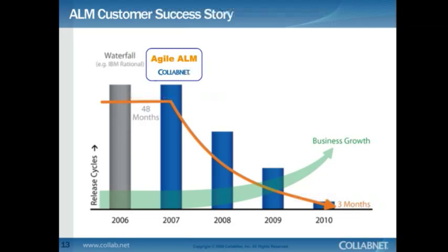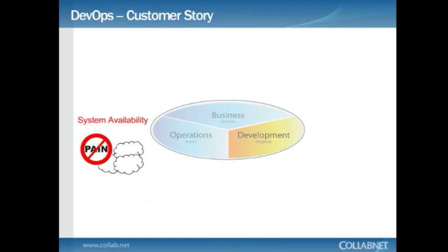Again, it's not perfect. There are some painful processes. IT operations has historically held this organization hostage for about 3 months before they were prepared to introduce the project. So the projects themselves were getting done in a very short period of time, and then they were being held for what they call the ITIL or the BSM change windows, which could be 1 quarter or even 2 quarters out, depending on the timing of the release itself, which is one of the reasons why we're sitting down and talking about DevOps with organizations that have gained efficiency on the Agile development efforts.